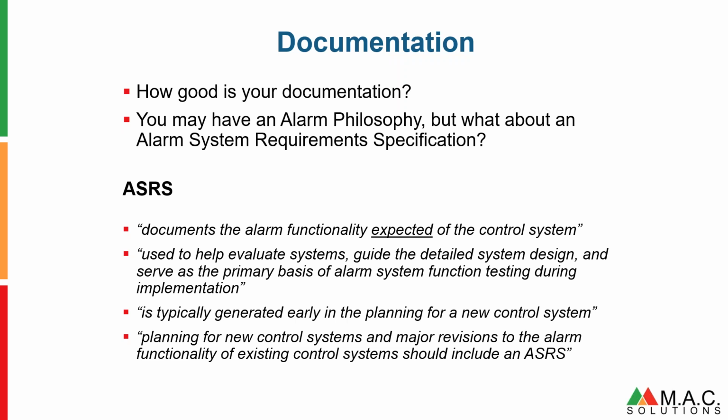These 4 points here, bullet points, are taken from the standards. They are little clauses taken out of the standards. So an ASRS is used to help evaluate systems. If you're putting in a new system, does it have the features and functionalities that you require, that you want? It serves as the basis for alarm system function testing during implementation.